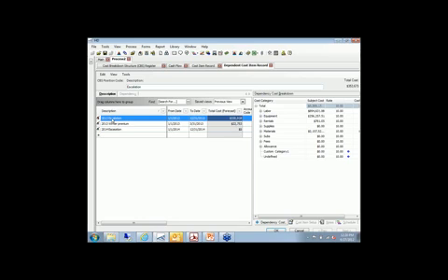So if you look at this 2013 escalation, we've come over to the right and we've said we're going to escalate everything by 10%. Anything that happens in 2013, we're going to escalate the labor cost 10%, the equipment cost 10%. You can set those separately. I've just put them all to 10%. As we get into 2014, you can see they're all 15%. But right now there's no work going on in 2014, so there's no escalation dollars in there.